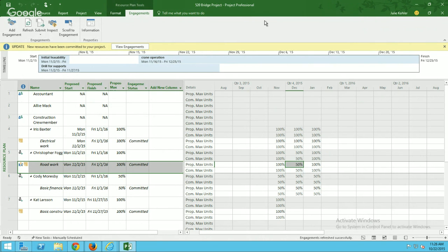Maciej, I hope I'm saying the name right. Does the PM have to do it manually? That's what this question is. Just because he changes something doesn't mean it sends a notification to the RM. Yeah, it does need to be manually resubmitted. So once you've made that change, you will see the indicator telling you that something has changed and it has not been submitted. So when you see that green indicator, you'll know that you need to resubmit that.